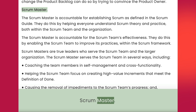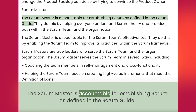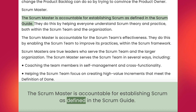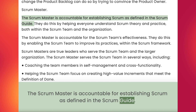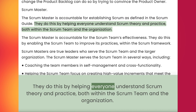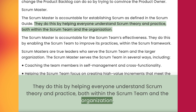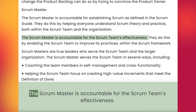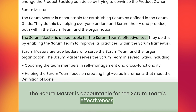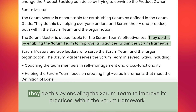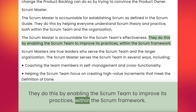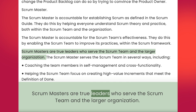Scrum Master. The Scrum master is accountable for establishing Scrum as defined in the Scrum Guide. They do this by helping everyone understand Scrum theory and practice, both within the Scrum team and the organization. The Scrum master is accountable for the Scrum team's effectiveness. They do this by enabling the Scrum team to improve its practices within the Scrum framework. Scrum masters are true leaders who serve the Scrum team and the larger organization.